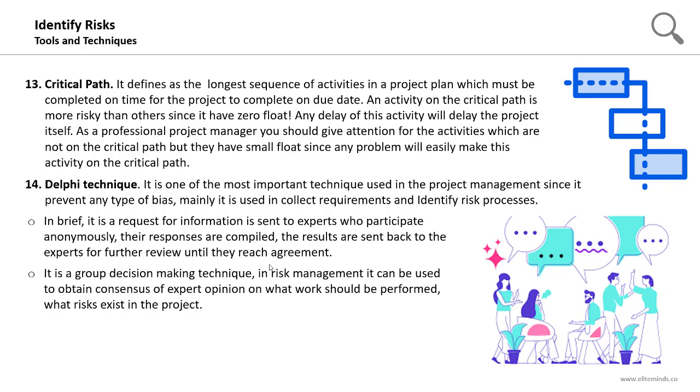It's a group decision-making technique in risk management. It can be used to obtain consensus of expert opinion on what work should be performed and what risks exist on the project. So the Delphi technique is about reaching consensus from experts' opinion on an anonymous basis.